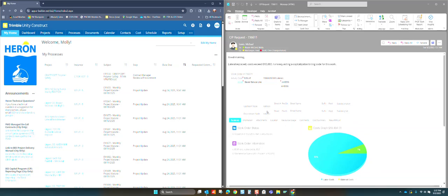So the number one thing I want folks to try to remember is that the costs that are reflected in Hansen or Infor are not the direct costs always. So you want to make sure that these costs are confirmed through PBOTMO supervisors before you do this type of project request, because it's not always accurate. Like, this isn't linked directly to SAP. PBOTMO puts their costs and they're summarized by Maximo because they are from PBOT, etc. So this is all the information I would need.